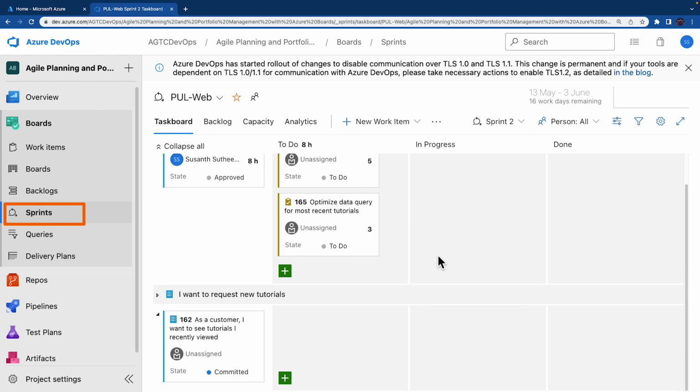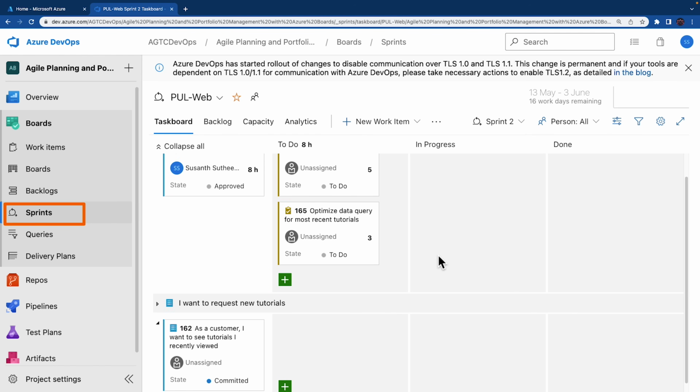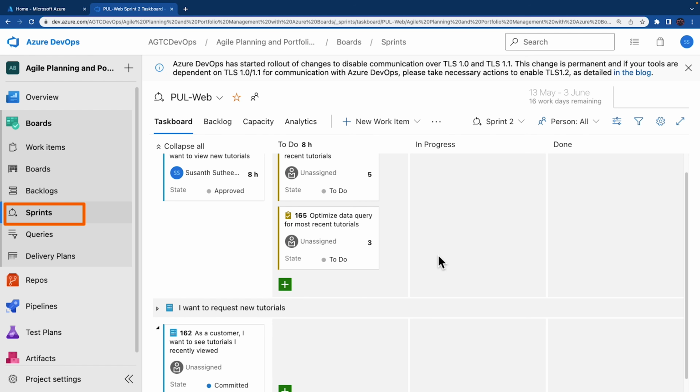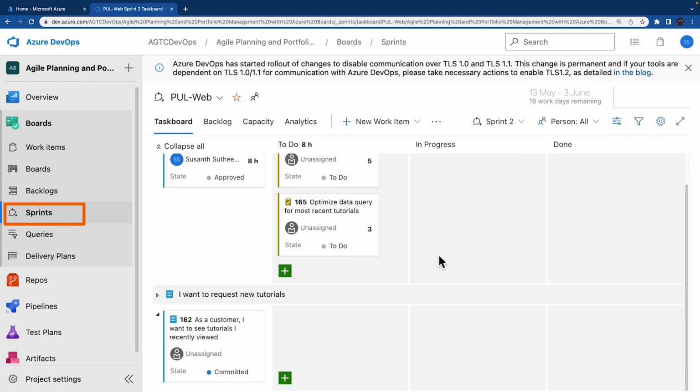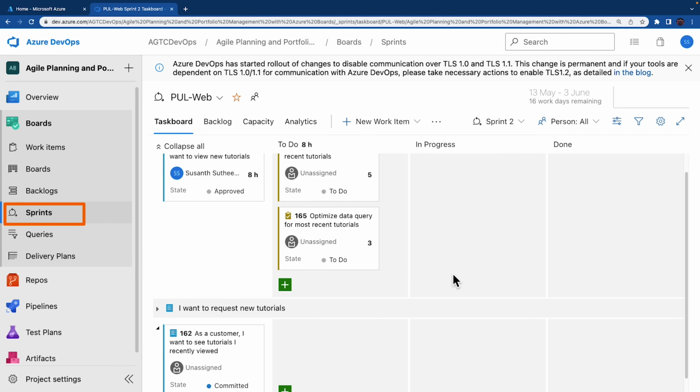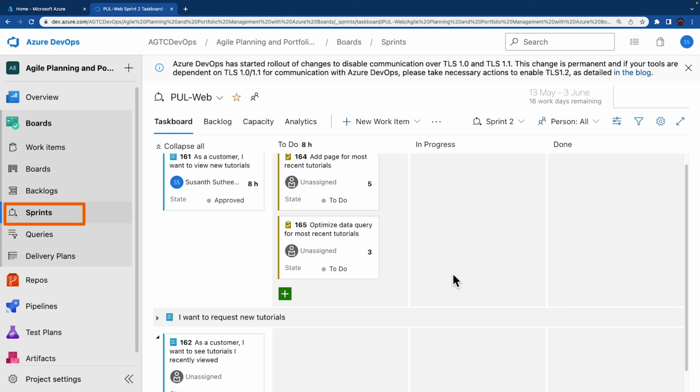In the first part, the team and the product owner identify the backlog items that the team feels it can commit to completing in the sprint. These are all based on the experience with the previous sprints. These items get added to the sprint backlog. And in the second part, the team determines how it will develop and test each item. They then estimate the tasks required to complete each item, and finally the team commits to implementing some or all of the items based on these estimates.